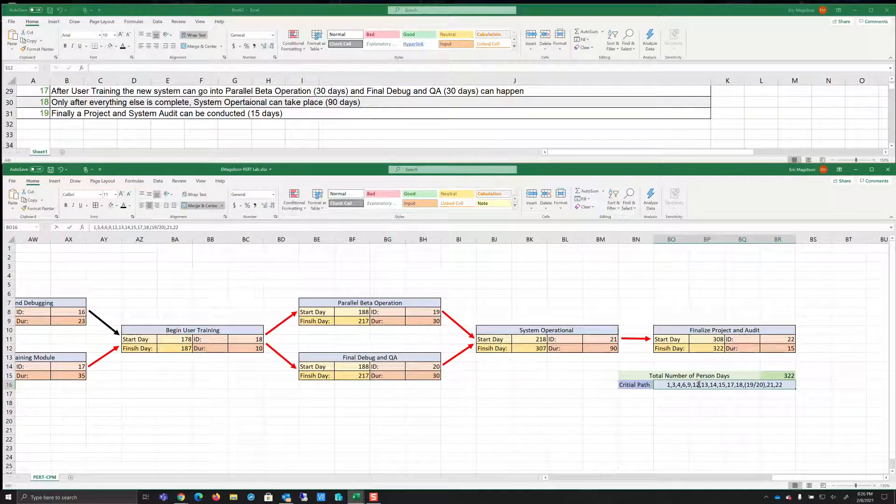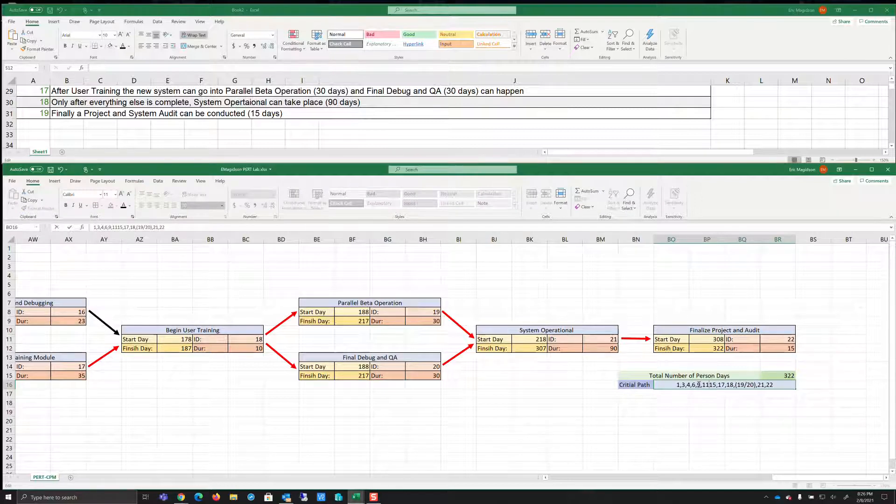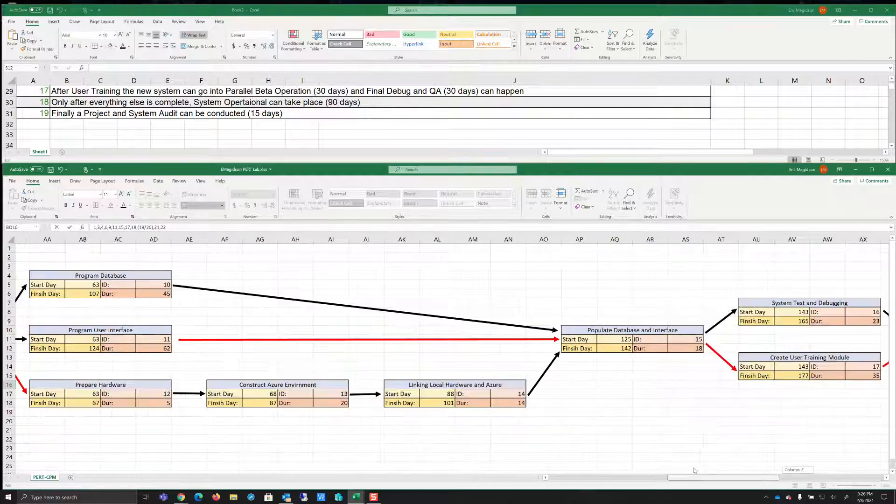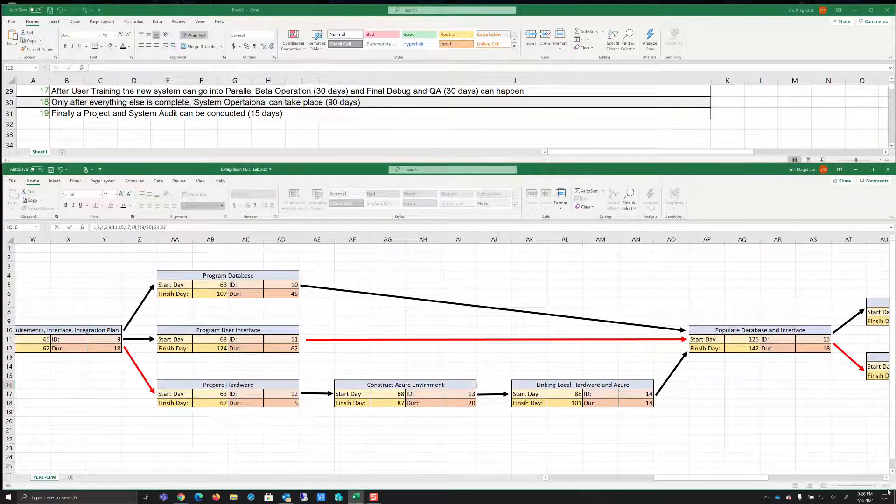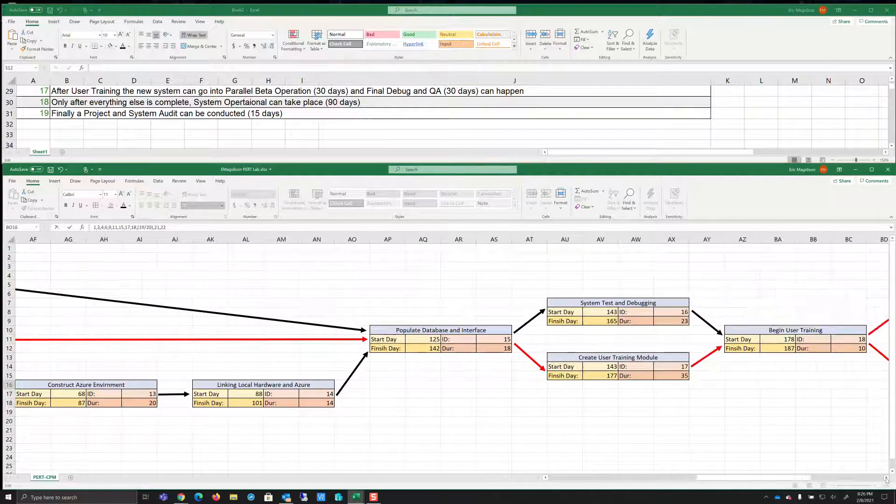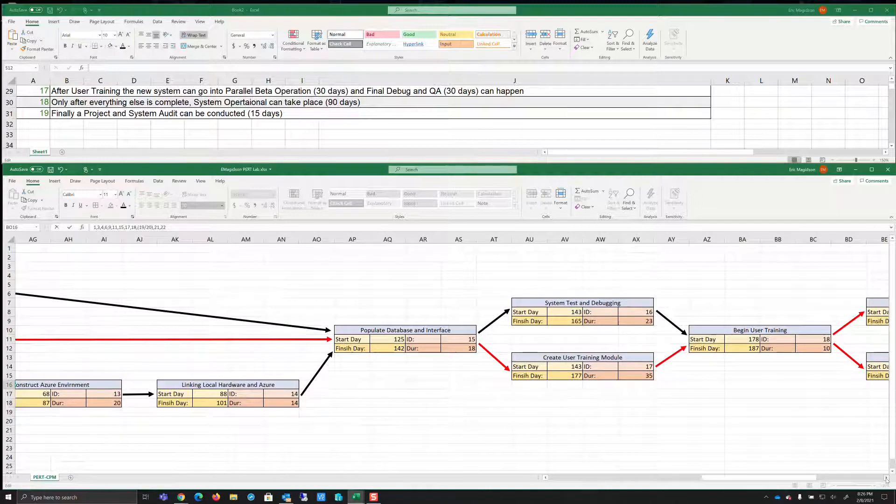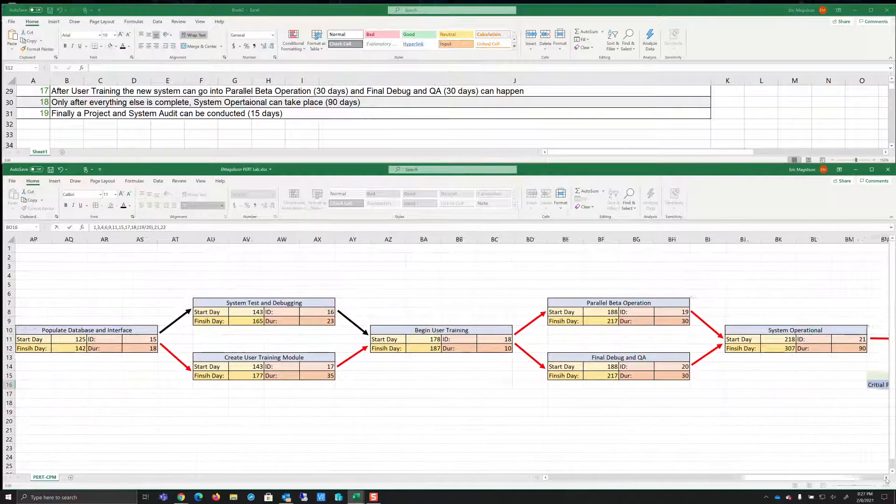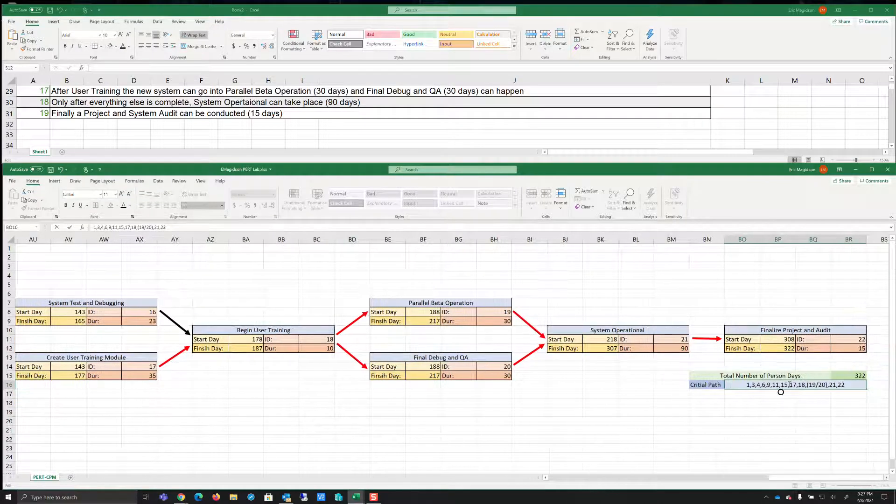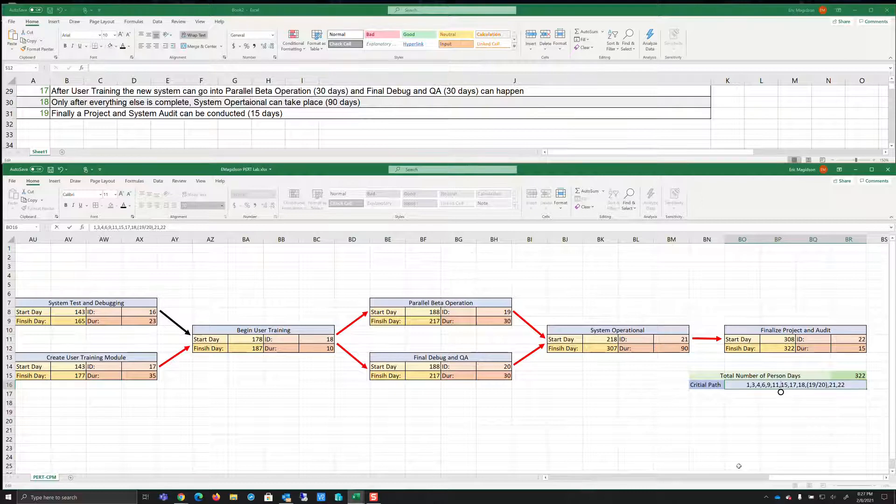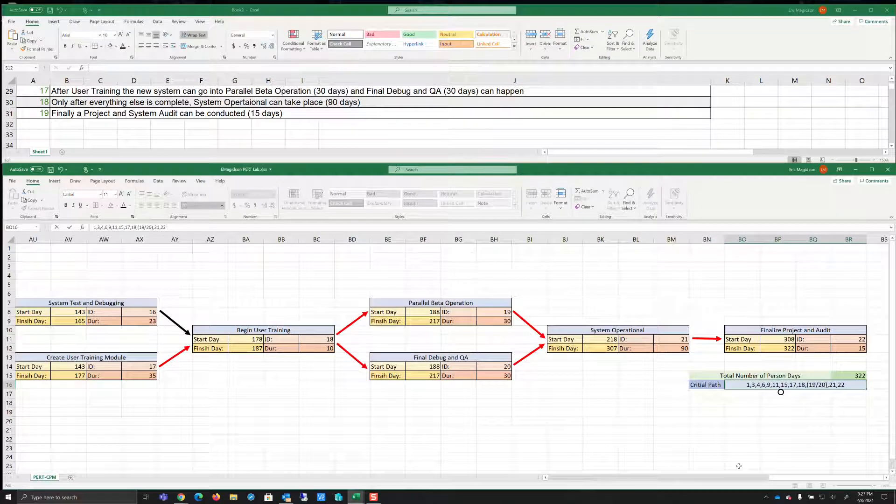We're going to delete 13 and 14 because those can be done, but we still have to wait to start 15, our critical path. Then from 15, it's going to go to 17, 18, 19, or 20, 17, 18, 19, or 20, 21, and 22. And folks, that is the critical path and the PERT CPM chart for this small project. Take care.